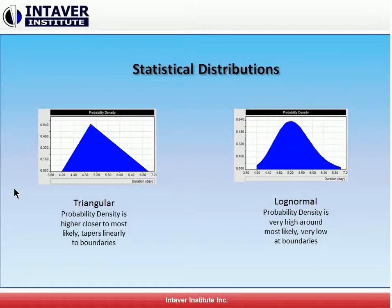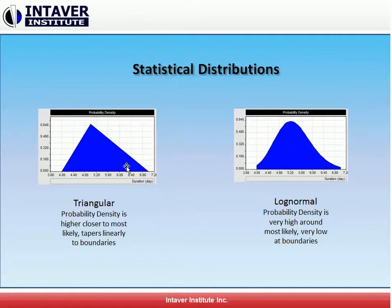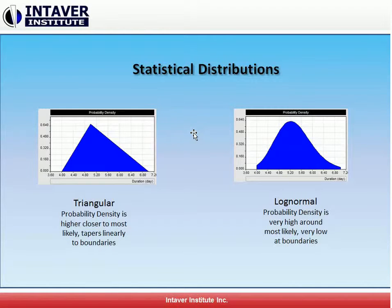Different distribution types have different shapes — for example, higher peaks or longer tails. But does this really make a significant difference? When we model activity durations, we're really modeling how long we think the activity will take to perform given uncertainties. We estimate the most likely, the lower optimistic duration, and the higher pessimistic duration, along with the statistical distribution. So we are providing boundaries as well as the shape to the expected results.